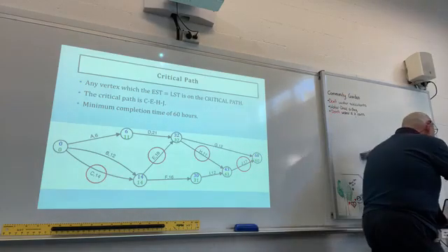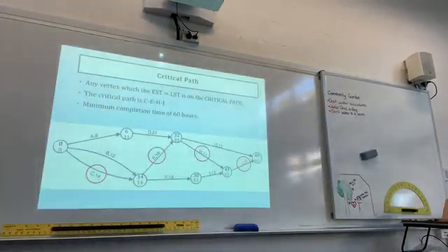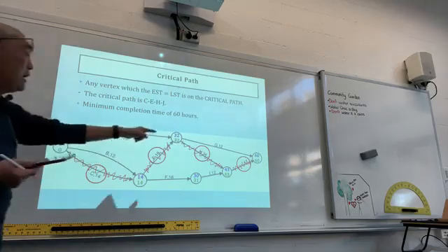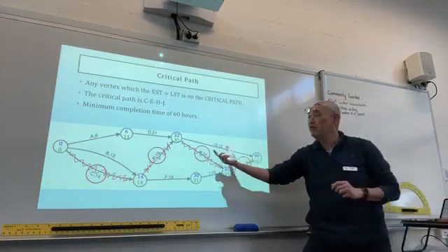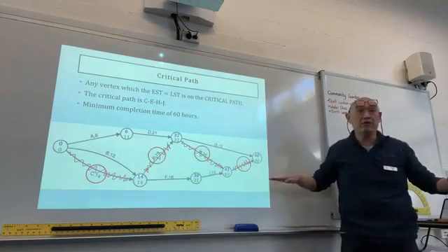So in the exam itself, if you were asked to indicate on the graph what the critical path is, remember, this is what you should do, to very clearly indicate that that is the critical path. So you must complete C, E, H, and J on time. All the others, you've got room for movement. But these 4 projects, you cannot move at all.